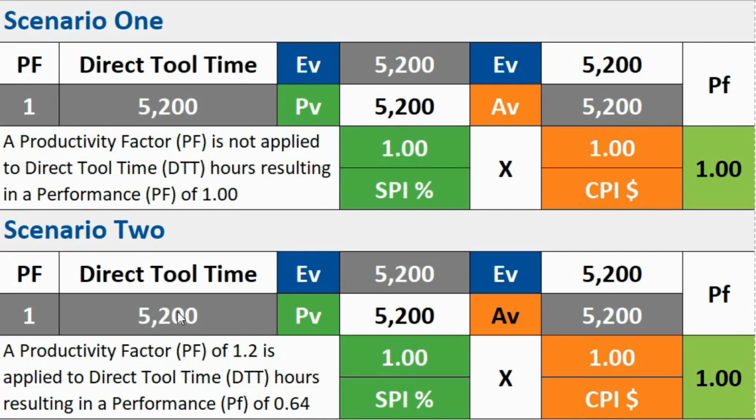Before we begin, we're going to make some assumptions. 1. A productivity factor is applied to direct benchmark estimates on step-out plans, and all activities are direct tool-time related. In other words, we have not padded hours to make up for non-productive time, nor have we added any indirect activities into the step-out plan to make up for safety meetings, permitting, breaks, travel, etc.